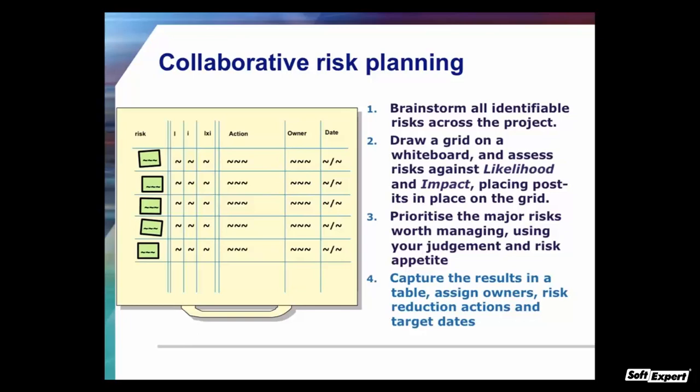Good risk management means moving risks down on both axes — lowering both likelihood and impact. When assigning owners collaboratively, it's not you as project manager saying 'John, I want you to own this risk.' You list the actions and in collaboration ask: who is the best person to own this risk? Is someone in this room able to own it or do we need to draw someone else in? That is the best way to get buy-in and shared ownership so you don't end up owning all the risks yourself. At minimum, your risk register must include what action you're going to take and who is responsible for making sure it happens.